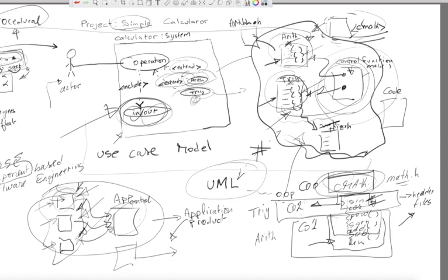When you have tons of things to do as a software engineer, and it takes weeks to do things, you're going to have to organize them. If you're doing Agile and Scrum, you organize into what we call sprints. Then within each sprint, you're going to break down the amount of work you're going to be doing, where your velocity, or the speed at which you accomplish these tasks, is going to be as steady as possible, so things are predictable.